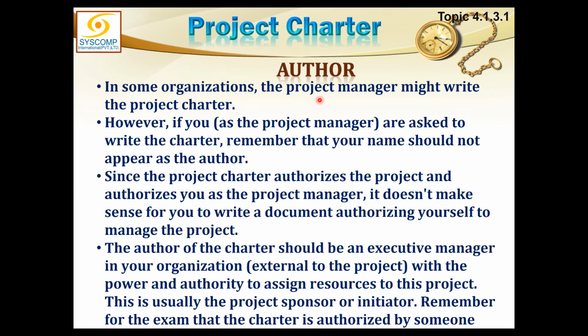The author of the charter should be an executive manager or a sponsor, whatever, external to the project. It should not be living within the project, because the biggest man in the project is the project manager. So this person should be in the organization with the power and authority to assign resources to the project. This is usually called the project sponsor or initiator. And remember, from the exam point of view, the charter is authorized by someone external to the project. I'm not saying external to the organization. He is a person from the organization, but he is a person outside of the project. He is not in the project team.